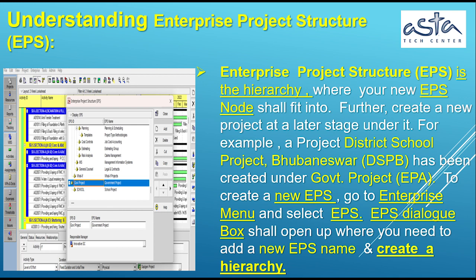Understanding Enterprise Project Structure, EPS. Enterprise Project Structure, EPS, is the hierarchy where a new EPS node shall fit into. Further, it helps in creating a new project at a later stage. For example, District School Project, Bhubaneswar, DSPB, has been created under Government School Project, EPS.